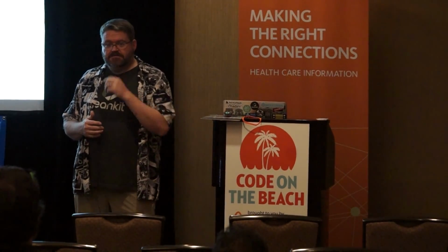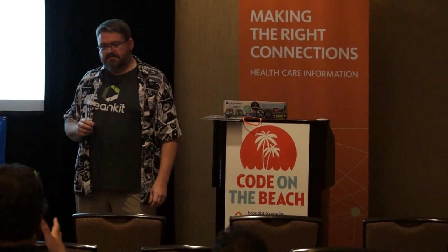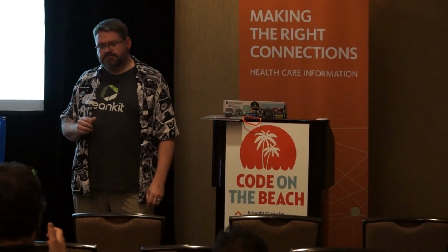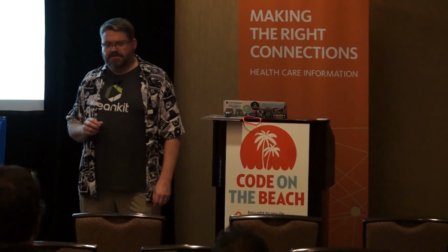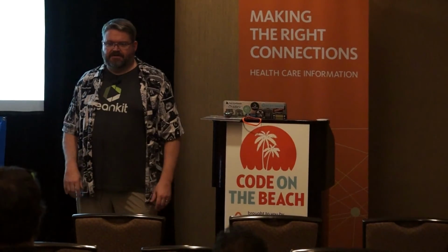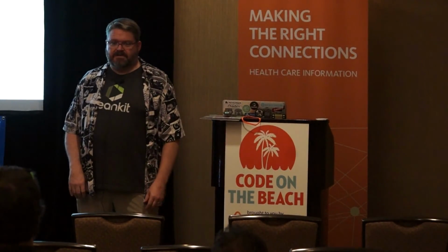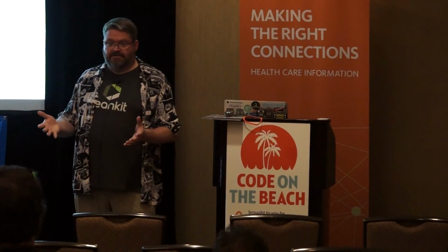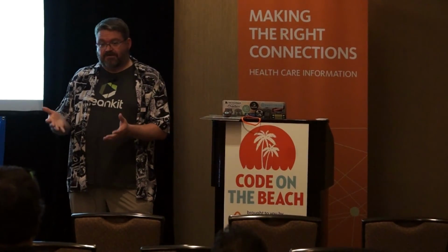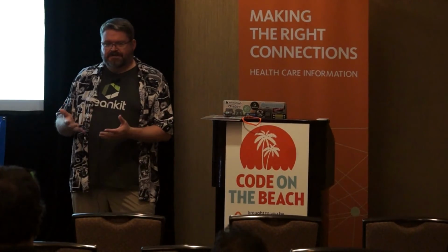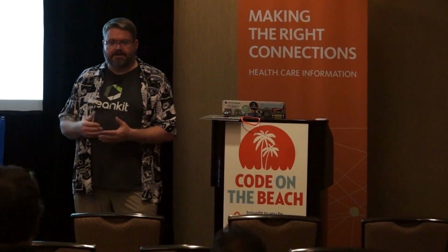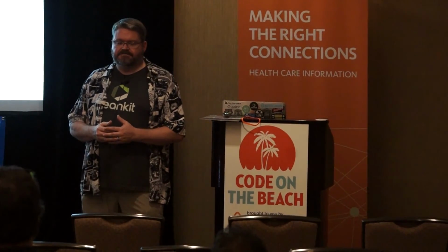It seems like you would pull one thing off there. I mean, what you're saying makes sense, but let me pull the most important thing off, get that done, and then I'll get the next thing. I can do one thing. As an individual, yes. But as a team, say you have 3 developers, a starting place would be 3 things in process, but maybe you want to do 2 things in process and force a couple of guys to collaborate and pair, that kind of stuff.